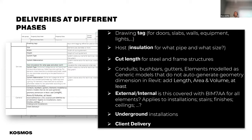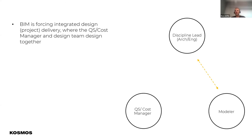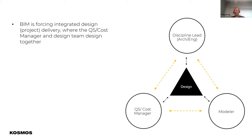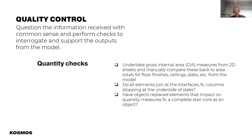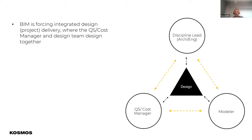External versus internal — is that covered within your definition and coding structures, and how is that visible within the design information? Especially if you have soffits externally versus ceilings internally — often designers may design these all as just 'ceilings' without defining soffits externally versus internal ceilings. Collaboration, collaboration, collaboration — between the cost manager and quantity surveyor, the modellers — and remember there might be a separate modeller for architecture, services, and construction — and different discipline leads. We need to communicate with all of them to deliver top-quality design and information, all defined within the BIM execution plan.